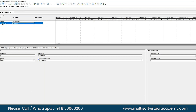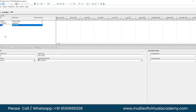Right-click again and click Add if you want to add another WBS — it becomes a child of Engineering. So if you want to break Engineering into more detail levels, you'd add Civil, Mechanical, Electrical, etc. The numbering — like 1.1 — starts calculating automatically. You don't need to worry about it.